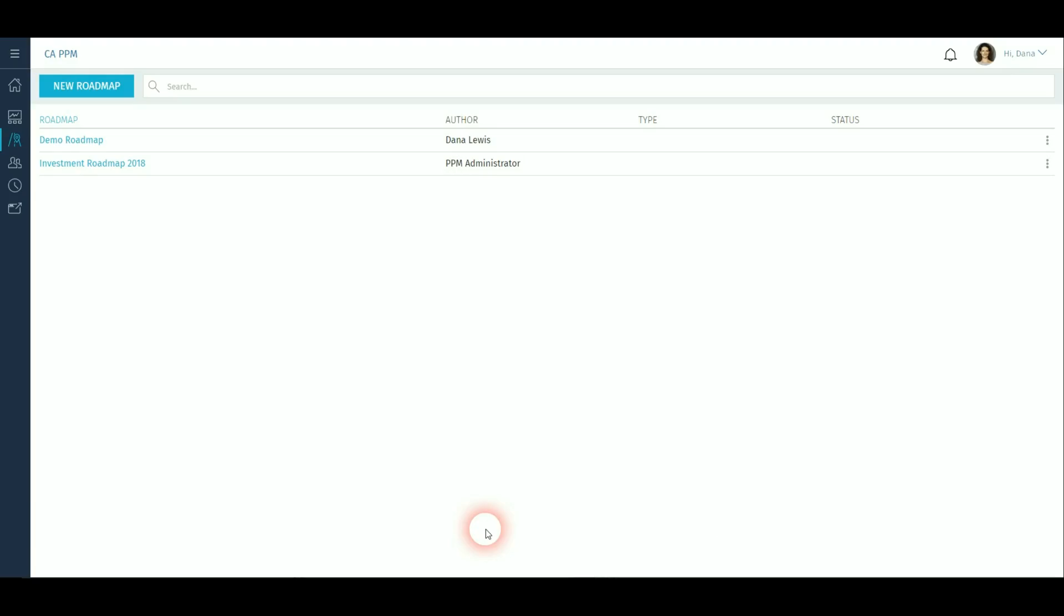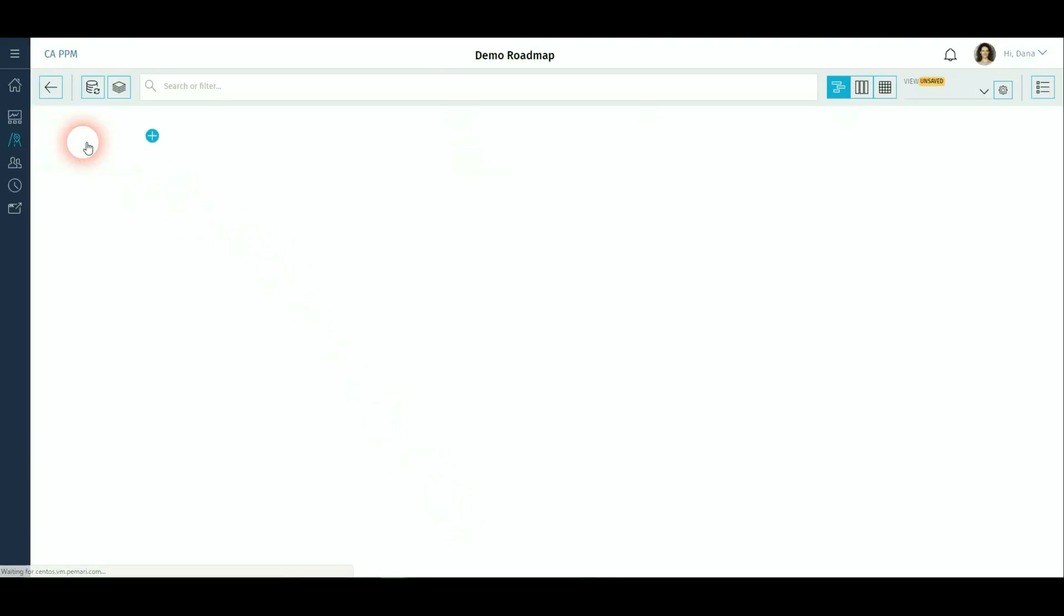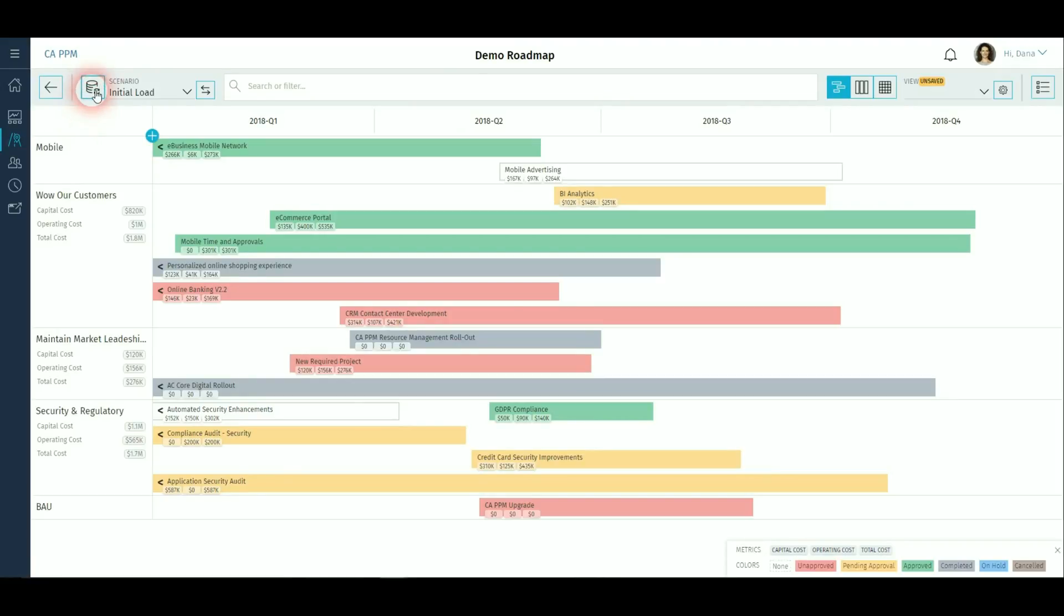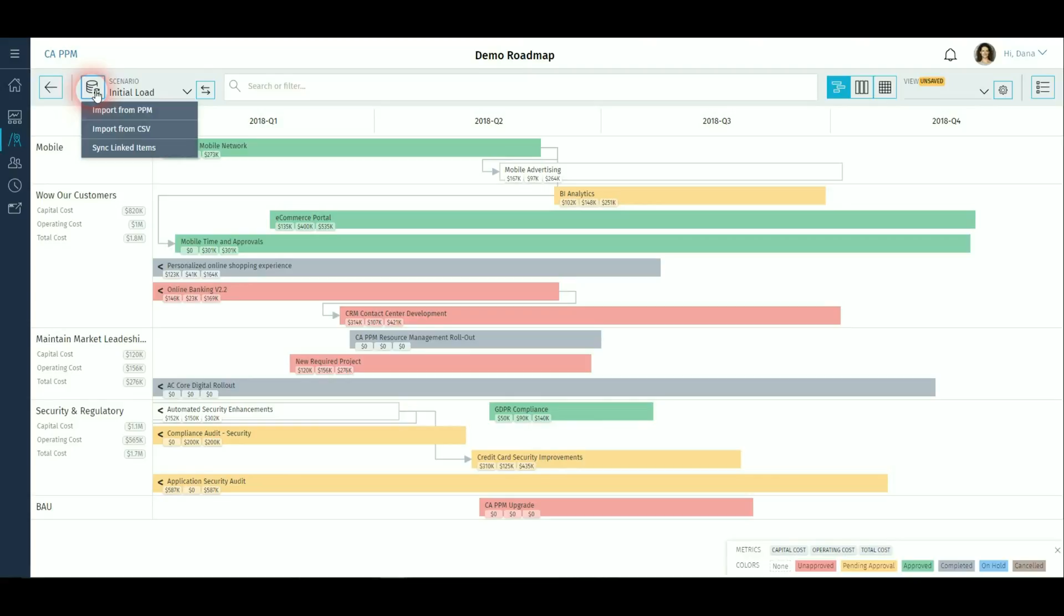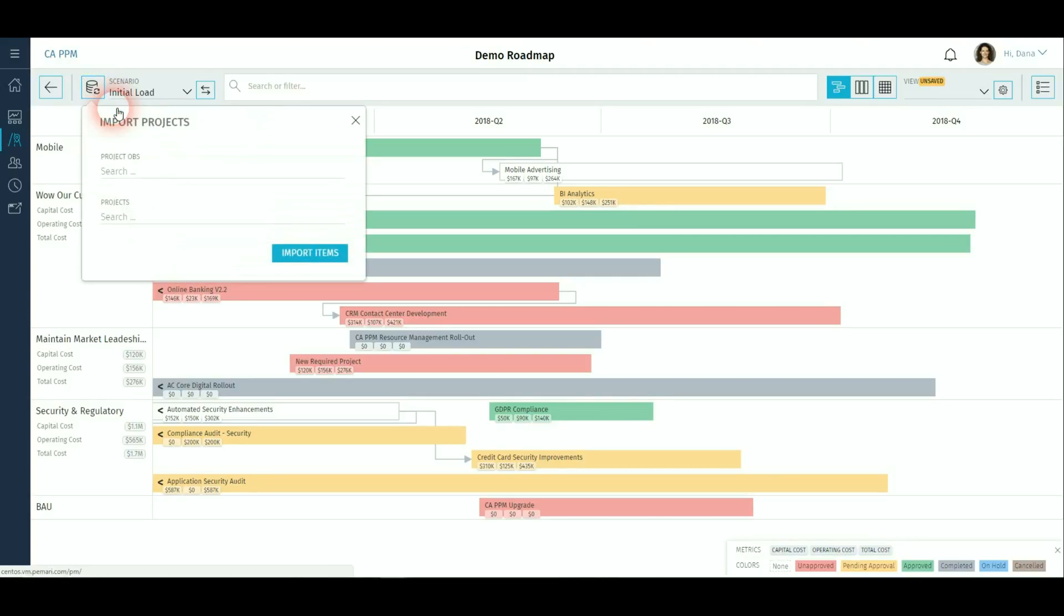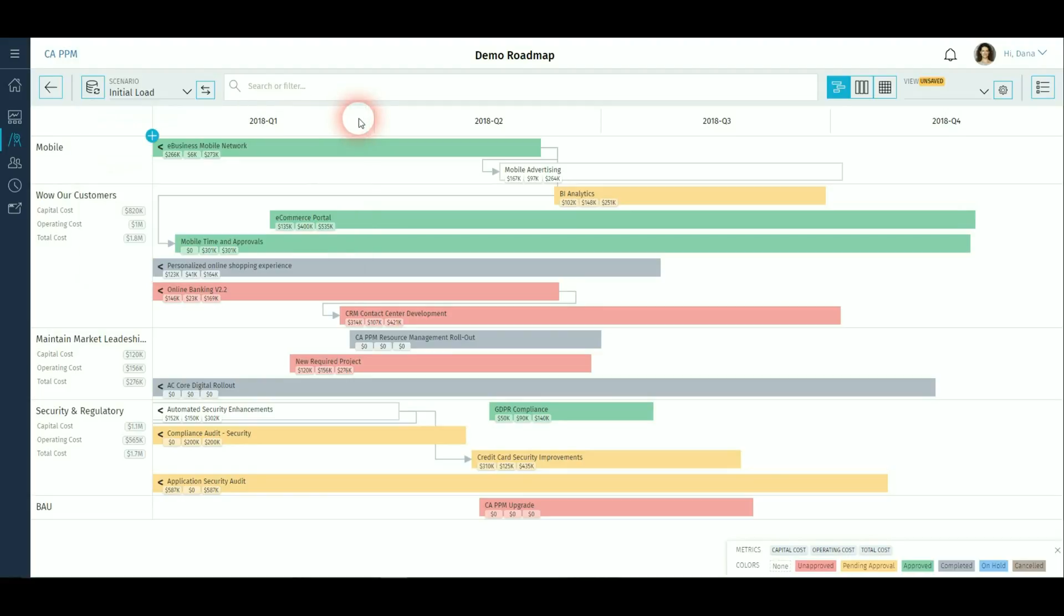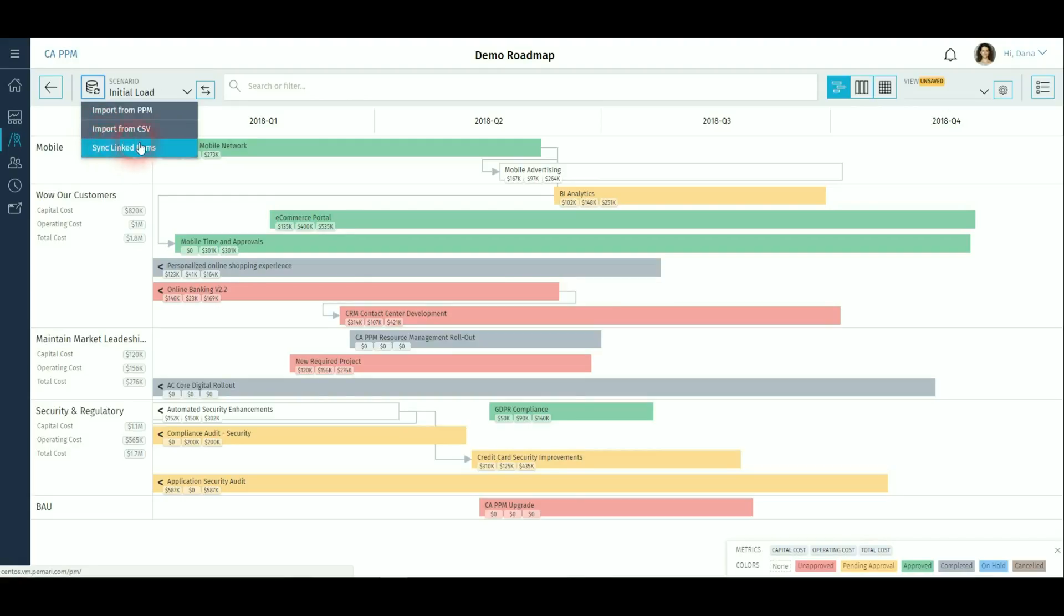Roadmap planning focuses on a top-down approach rather than the more traditional bottom-up approach of portfolio planning. It's intended to be lightweight, collaborative and visual. You can import items from the projects in the system either by OBS or individually. You can also load from a csv file to have indicative pipeline shown for planning purposes. A sync option is available to keep information up to date when you require.